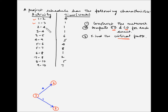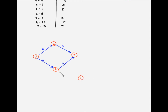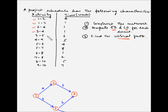Next is 2-4 and 3-4. So both 2 and 3 are actually going to merge into 4. Let us draw 4. This is the activity 2-4 and this is the activity 3-4. Activity 2-4 takes 1 week and 3-4 also takes 1 week. So we have completed 2-4 and 3-4. Now next is 3-5. This is the only other activity where 3 is preceding any other event. Let us draw event number 5 and the activity 3-5, which takes 6 weeks to complete.